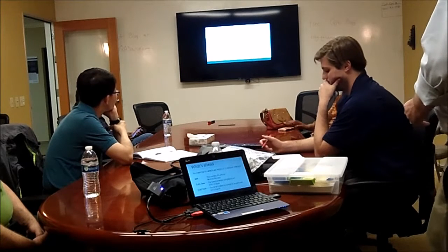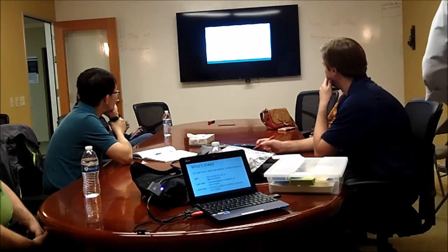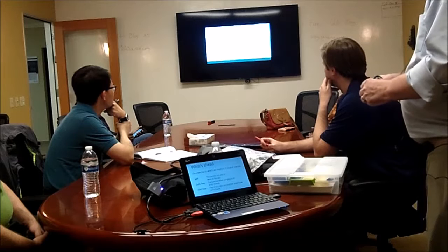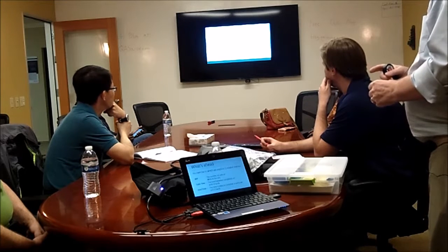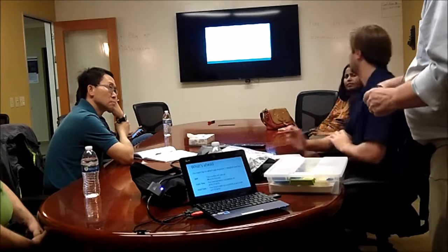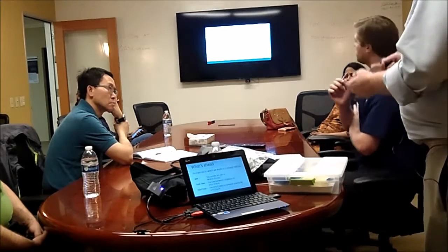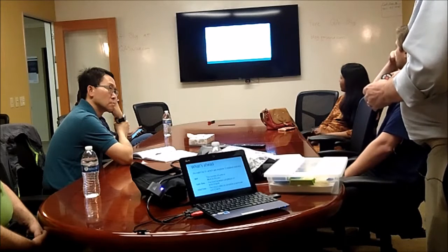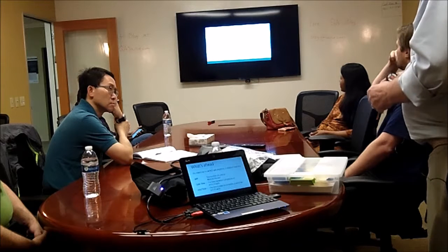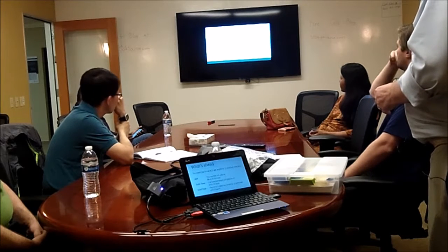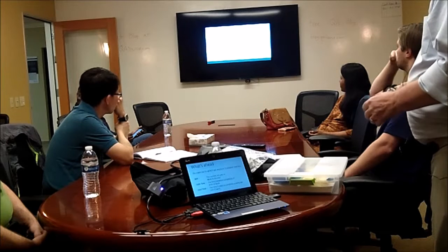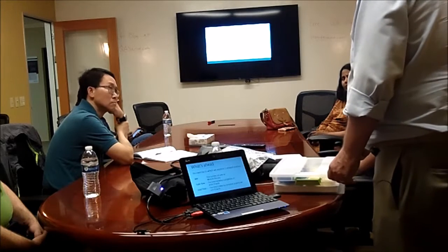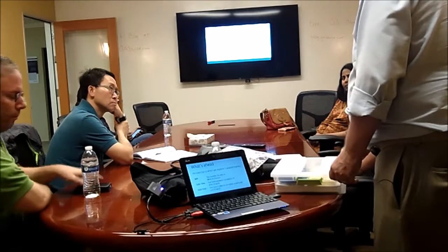And then the lead time is also defined in a confusing fashion in some places. It's the time it takes to complete a particular unit of work, not just any unit of work, but one particular one. So if you feed this into the system, how long does it take to get out the end? Cycle time and lead time seem to track each other. They're not the same units, but they seem to track. Sometimes the lead time can just grow and grow and grow, and this is not good. Lead time growing is a real sign that something's not ever going to get done.